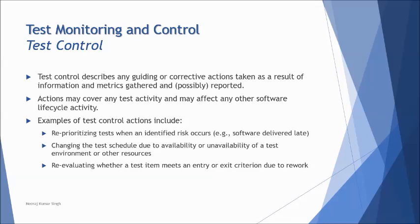Here are some sample examples of test control activities. For example: reprioritizing tests when an identified risk occurs — if you had already created and prioritized test cases but identified certain risks, and that risk actually happens, the next action would be to reprioritize the tests to accommodate that risk. Changing the test schedule due to availability or unavailability of a test environment or other resources. Re-evaluating whether a test item meets entry or exit criteria due to rework. Overall, test control is about having an alternative plan or action to take if execution seems to be deviating from the plan.